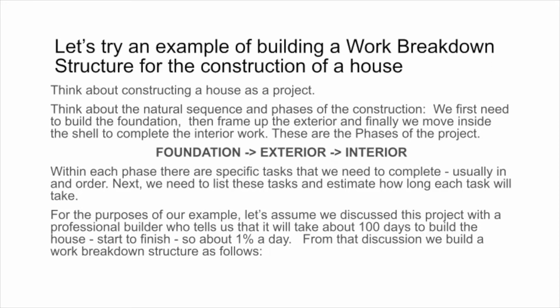So in terms of a broad category item, let's look at the foundation and let's dig into that a little deeper, pardon the pun. In order to build a foundation, you need to dig a hole first. You need to put a hole in for footings. Now, you may not know much about building houses, so what you need to do is go talk to experts and ask them, how do you build a house? The foundation is first. How do you build a foundation? What are the steps involved in building a foundation? So we got to go through that step process with either ourselves or in consultation with experts.